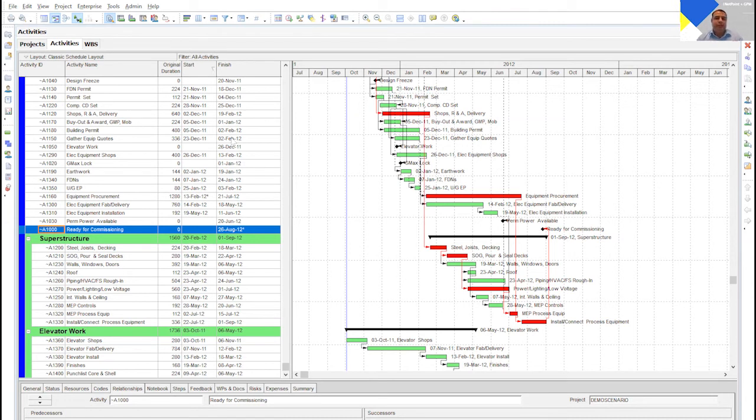Maybe I cut it down to 2 and work from the 3rd front a little later when some other resource gets released from a different place, right? So you shift that work later. How do you hold it over there in a CPM schedule? You cannot. Either you add in more links to put it in place, but those links technically aren't required for that work to continue. That relationship is just to hold the activity in place, right?